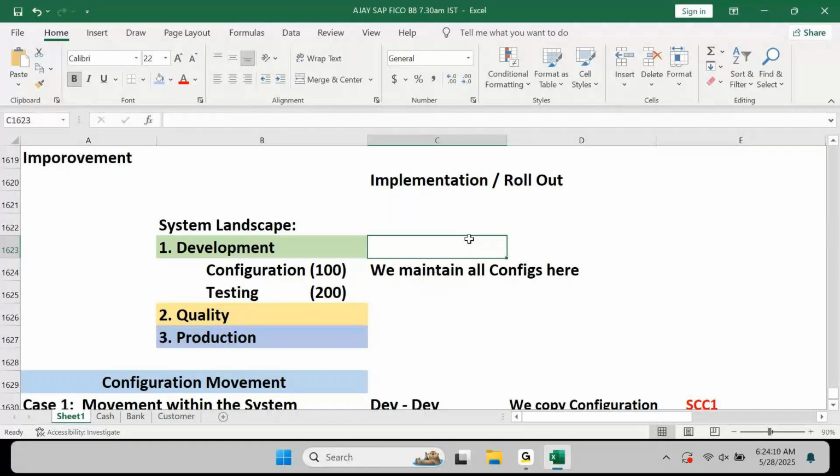When you're talking about version management, for example, I am preparing the first blueprint today. Based on the discussion, I am preparing the first document. I will send version 0. Or we will call it the initial draft document or version 0, which I will submit to the client. Once I submit the initial draft or version 0, the client will go through the document and they will highlight the mistakes. They will highlight: these points we also discussed, but it is not documented; this process is documented, but we said we don't want this.